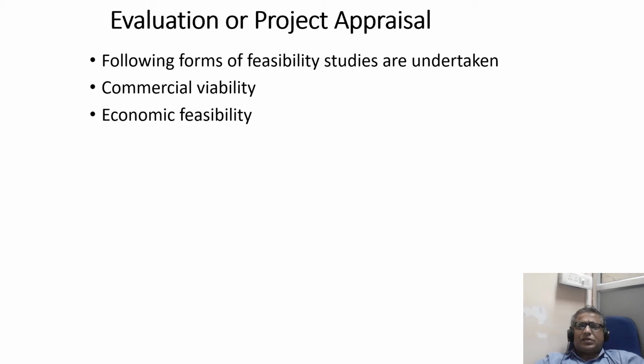Then you have to make your revenue projections. The revenue of your business activity should be based on the assumed share of the target market. The next part of your project proposal will be the financial feasibility study. Financial feasibility study is about cost and profits. Financial viability of the project should provide specific information about the total estimated cost of the project, full details of the assets to be financed and how liquid those assets are, the rate of conversion to cash, how easily the various assets can be converted into cash, the project's funding potential and payment terms, sensitivity in repayment capabilities, LTV, IRR, BCR, and profitability index. All those things are very important parts of financial feasibility.